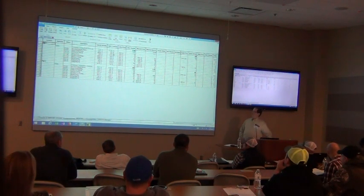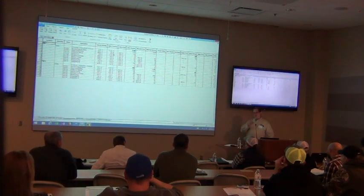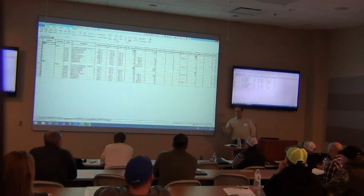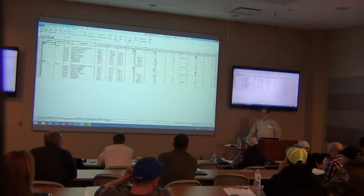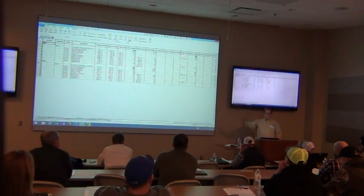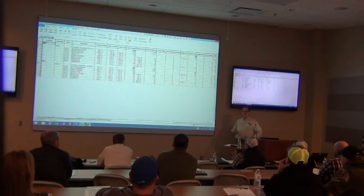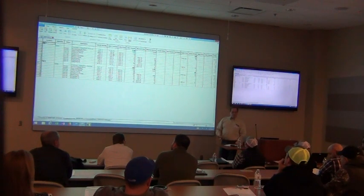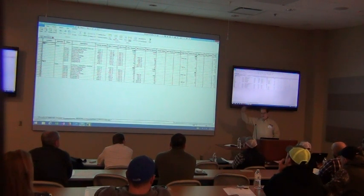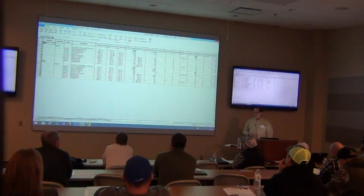One client I worked with puts line items in their estimate even if they have no money assigned. Because it's a reminder to someone else in the process that they thought about it and clarifies who's covering it. They were a flooring contractor — a lot of times the underlayment or cement board underneath the tile is not installed. Was that the homeowner, the home builder, or them? The person going out to do the job has something in front of them to clarify who's doing what steps, so they know if they end up doing it, there might be another charge, or it just clarifies who handles what.